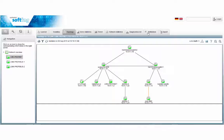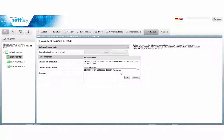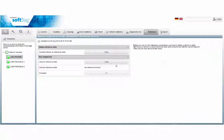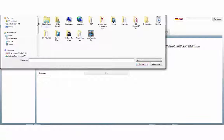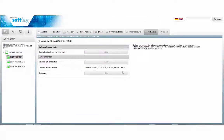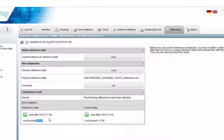After successful commissioning, the good state of your network can be saved for future reference. Later on during operations, you will have a point of comparison to the actual state of the network, enabling you to more easily identify possible differences and potential sources of errors. Often, already small changes — like in this case an inverted port with connectivity issues — are causing package losses in the network.